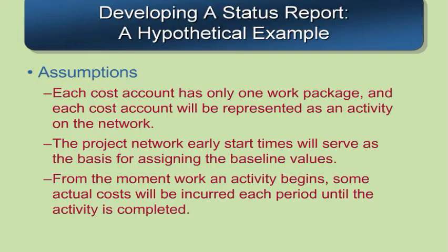Again, that's standard operating procedure, but some companies don't necessarily do it that way, which will affect how you calculate this. But if you want to do this correctly, you want to make sure that you've got direct linkages between cost accounts and particular activities. We'll also assume that the project network early times will serve as the basis for assigning the baseline values. That also is something very typical.